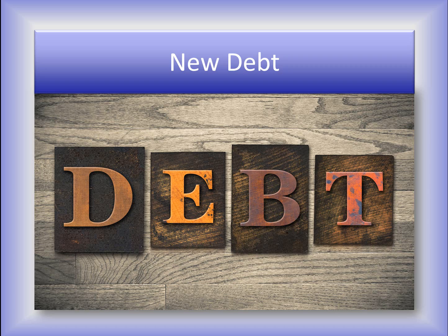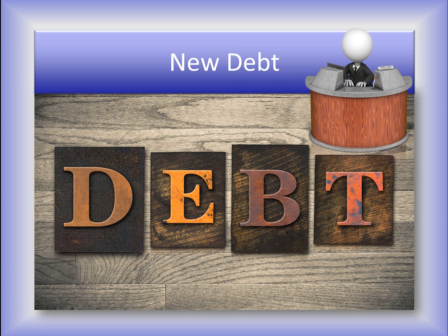Let's begin. A new debt that wasn't planned at the beginning of the year must be incorporated into the budget's two separate components. Of course, by new debt, I mean a new loan of money from a source such as a bank, the OPWC, the OWDA, EPA, or another institution that's offering government entities loans. These financial institutions often do not distribute money to the government directly so you can spend. They require you to request payments to be made directly to the contractors and engineers and other vendors as the projects move forward. So the money doesn't actually go in and out of your bank account.